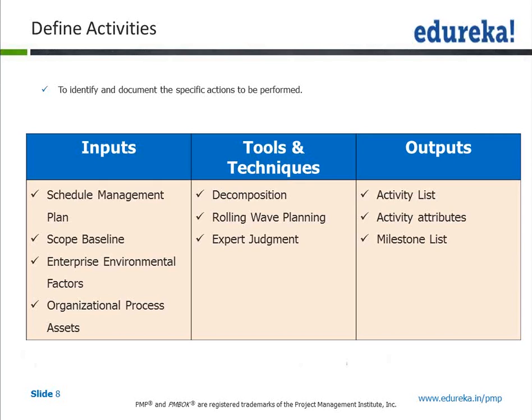More in a non-IT environment it is required that you can have different attributes in terms of progress, from where the resources will be taken, and you can have a certain cost code associated with the activity, so that whenever the resource is being utilized, you know how much cost has to be charged and so on and so forth.